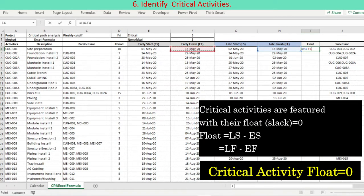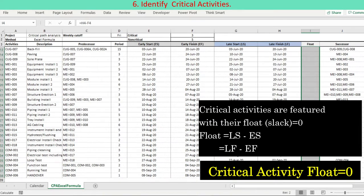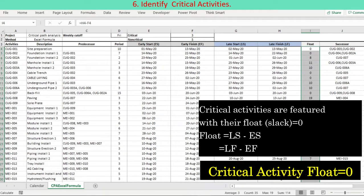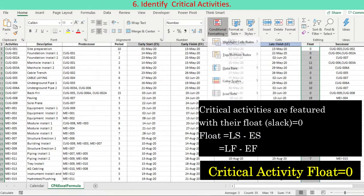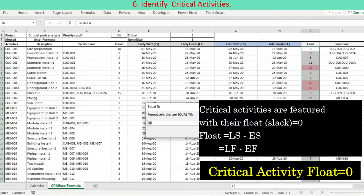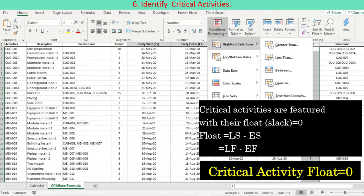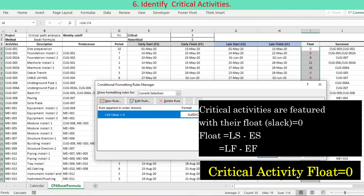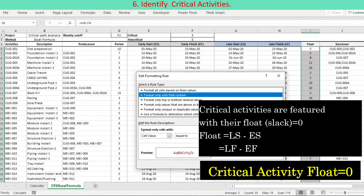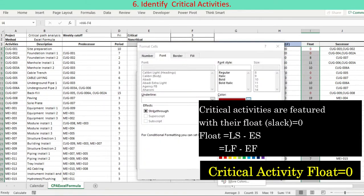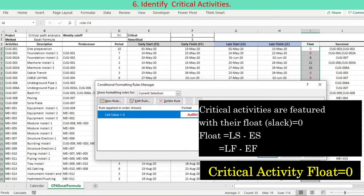Finally, we are able to identify the critical activities by referring to the early schedule and late schedule we have calculated. The criticality of activities is defined based on each activity's float or slack calculation. The float is computed by comparing the earliest schedule and the latest schedule of the same activity. If the latest schedule is later than the earliest — float bigger than zero — we may delay the activity without delaying project completion. But if the latest date is the same as the earliest date — zero float — it is not possible to delay the activity. Consequently, activities with zero float are defined as critical activities. Float is calculated as LF minus EF.